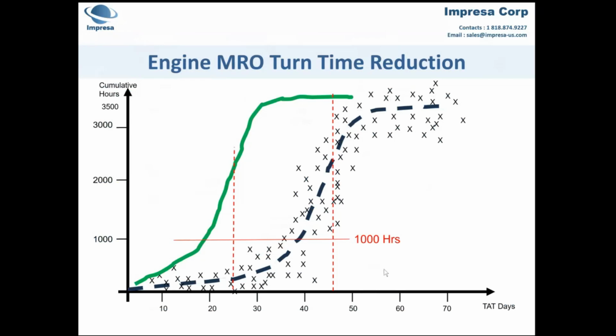The first area that came under scrutiny was the receiving to inspection process. Why did it take so long to determine the complete work content of an engine overhaul and the final list of replacement parts needed to make an engine fully serviceable? If it would be possible to reduce this initial phase to 20 days, then this would be a significant contribution to the overall target.